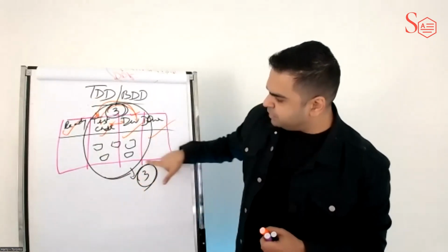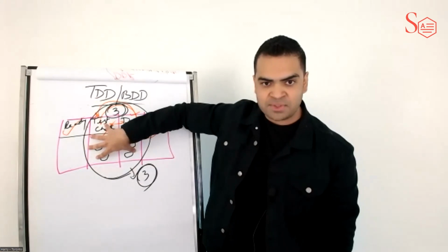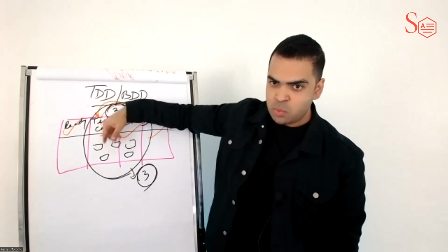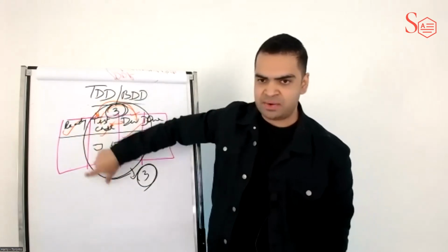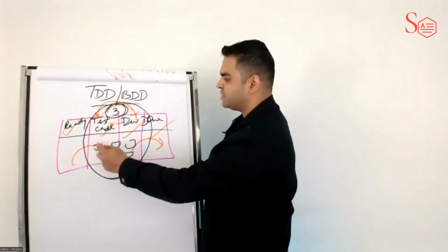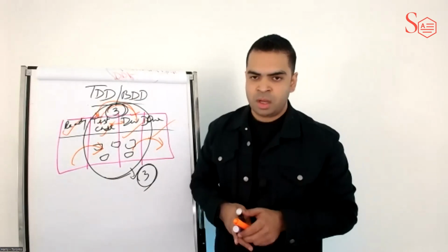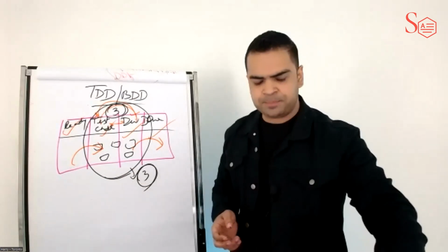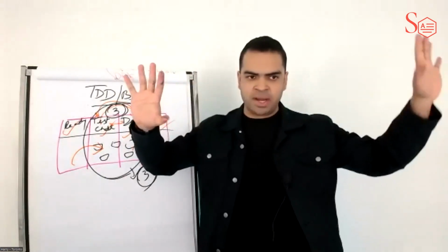So if we have a WIP limit of 3 over here, which means that as soon as there is 3 stories across these 2 columns, the team cannot start the next one, which therefore forces them to collaborate on these 3 stories, move something out, and then they get to start the next one. Now, how do we come up with WIP limits, and what is the impact of WIP limits? Let's see. So let's go back to our car wash shop. Remember our car wash shop? 5 people, 5 cars, QA, customer.